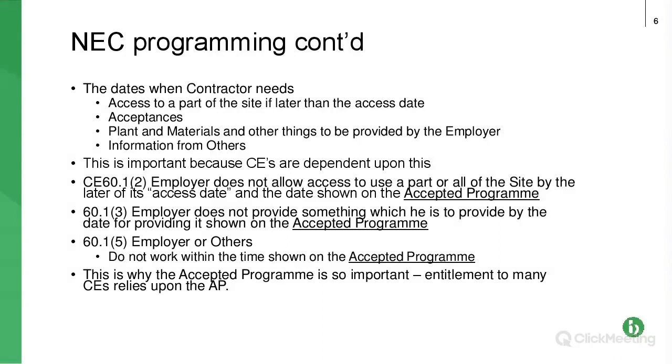Any acceptances that are required to be provided by the project manager, so acceptance for design, particular materials, etc. And this all makes sense because if it's in the programme, the contractor or the subcontractor has prepared the programme, so hopefully it's going to comply with it, but also it means that the project manager knows when it has to provide acceptances, access dates, etc.